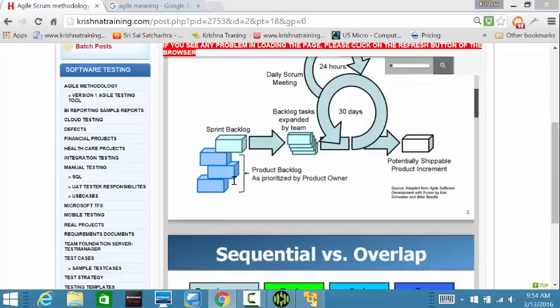No, that's not the case. What they have to do is split all those 12 requirements into chunks of work again, multiple phases of work, where they will be allocating these 12 requirements within the 5 months. How many weeks do 5 months mean? Approximately 20 weeks. 20 weeks divided by 12, or let's say 10 requirements, is approximately 2 weeks.